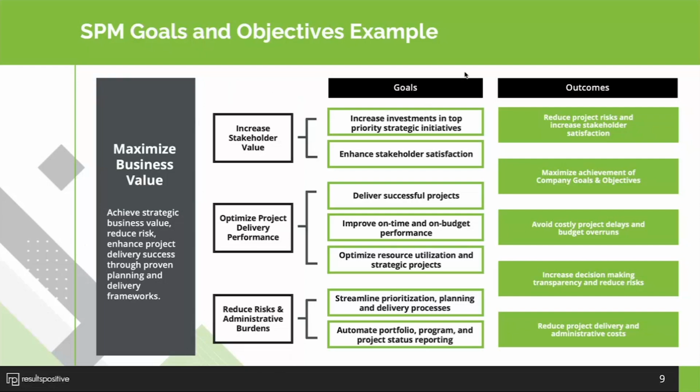So really start identifying your strategic priorities, putting this in terminology that's in ServiceNow. Then over here, we can put in our overall goals or OKRs if you set up the goal framework to align to OKRs. Once we identify those, then we want to identify what outcomes we're looking for. This can help drive the scope. It can help drive the overall roadmap to meet those outcomes based on your strategic priorities and your goals. Your strategic priorities and goals can change over time, so you want to reassess on an annual basis with your overall roadmap. But definitely recommend starting here so that all of your implementation efforts can be tied to outcomes that are going to benefit the organization.